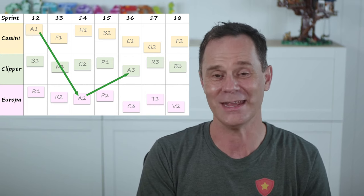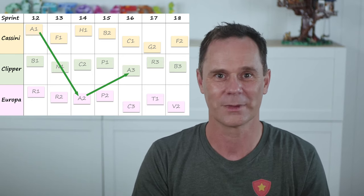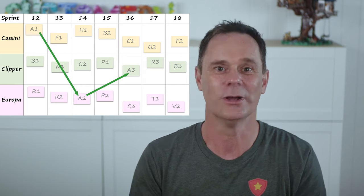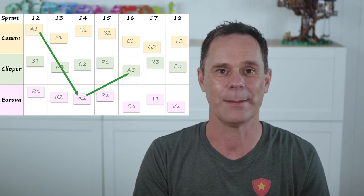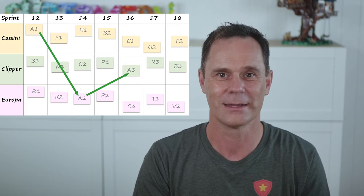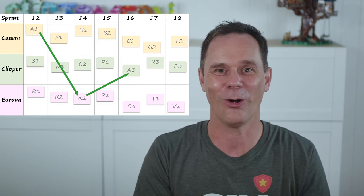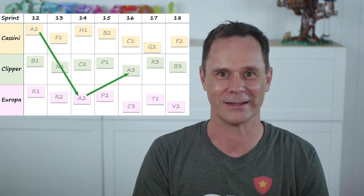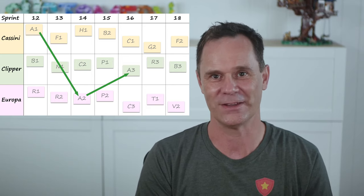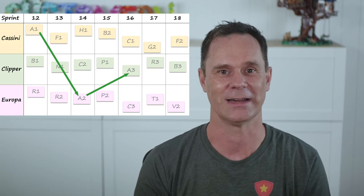Now we can see that A3 is dependent upon A2 and A2 is dependent upon A1. I've drawn an arrow from A1 pointing at A2 because when A1 is done, Clipper is unblocked and can start work on A2. Feature set A looks good — all the arrows point to the right. All three teams are working in the right sequence. There aren't any features dependent upon another feature being finished in the sprint immediately before, so there's even a bit of buffer. Perfect.